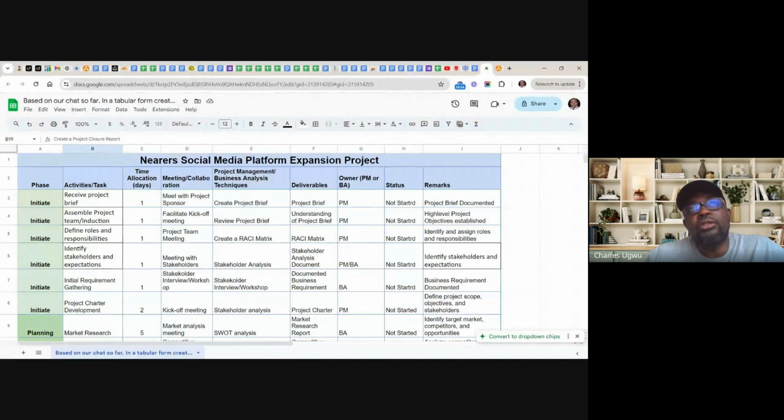From all you captured, you should be able to create a project brief, which you are going to use to address the other team members. That's why you are a project manager. This is the reason you are the leader. You have to do some work. You can't just start from the beginning and prepare. So you must understand this, create a sketch, which is the work breakdown structure, and then create a project brief, and then start.